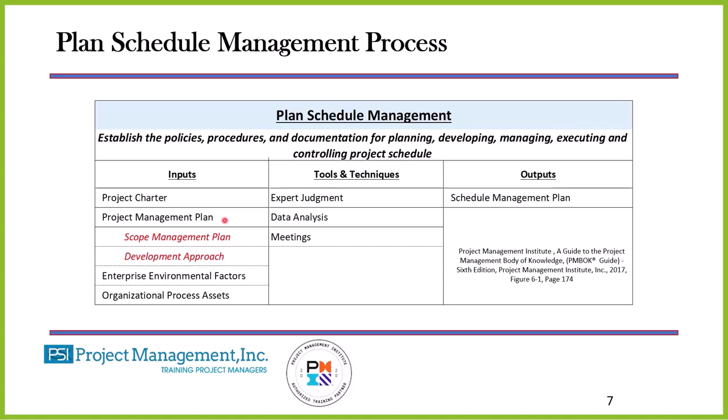We know now at this point what our WBS is going to look like and what our WBS dictionary is going to contain and things like that. Through that tool called progressive elaboration, we're learning more and more about the schedule. We're also learning more and more about the previous work we've done in planning this project. And of course, progressive elaboration says, as I learn more, I update to reflect that new information that I have learned. Another primary input here would be the project management plan,